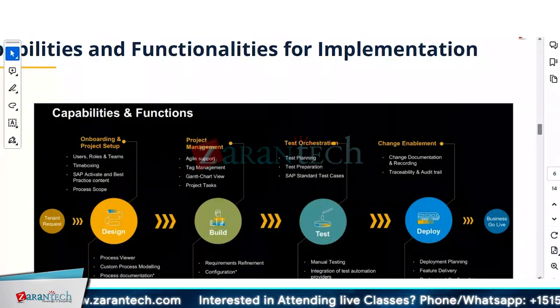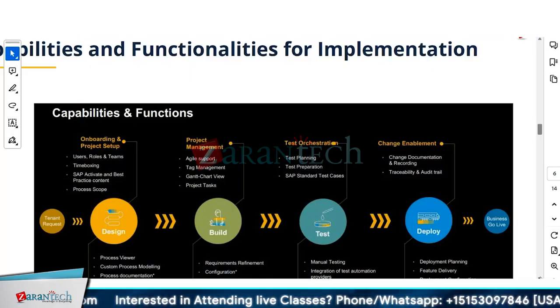You can also use the Gantt chart view. I've shown you that for most of these there's a Gantt chart view where you can do the linkage, which I'll show you. Linkage in the sense that, let's suppose there are four or five tasks, but one task is onboarding of the team. Obviously onboarding of the team is a prerequisite to start development. So you can have a relation that task 2 is interdependent on task 1, and until task 1 is completed, you cannot start task 2.